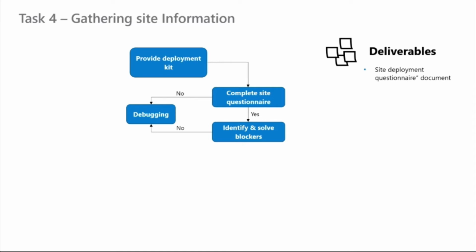So we send out a very comprehensive site questionnaire that allows us to make all these pre-configurations also on the side of the customer. Now, out of this questionnaire, there can be immediate issues and blockers that will be identified, and those will need to be engaged. For instance, if a certain protocol is not recognized while others are, where do we want to focus in terms of getting that information? Do we have any bandwidth capacity in a certain channel that is a little bit limited? Do we have any specific networks that we want to monitor in terms of VLAN or IP traffic?